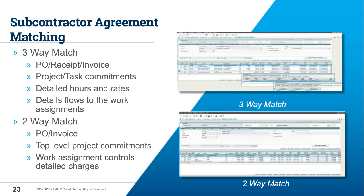Both two-way and three-way match are completely optional and give you flexibility on how you set up your subcontractor agreements. For a three-way match, a lot of details flow directly into a work assignment. For a two-way match, there's less data on the purchase order and more information is assigned at the work assignment level. Both are acceptable and give a lot of flexibility on how you want to set up your subcontractor agreements.